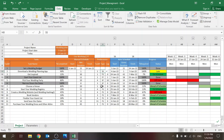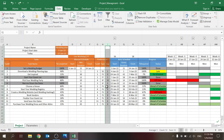The types are: Start-to-Start, Finish-to-Start, Finish-to-Finish, and Start-to-Finish. If you're not familiar with these: Start-to-Start means both tasks start at the same time; the most common is Finish-to-Start, meaning you finish the first task and then the second begins. Then there's the lag, which allows you to have a delay between them.